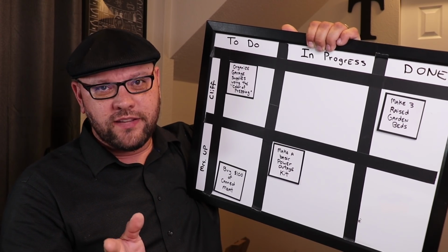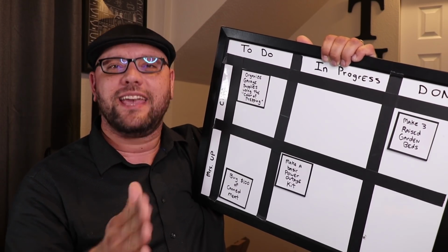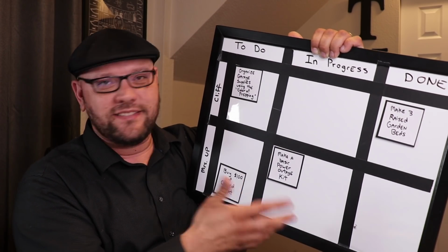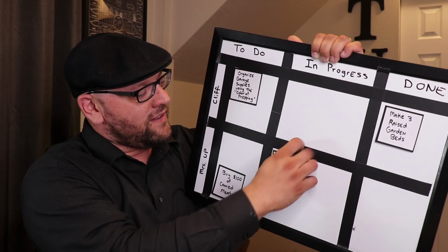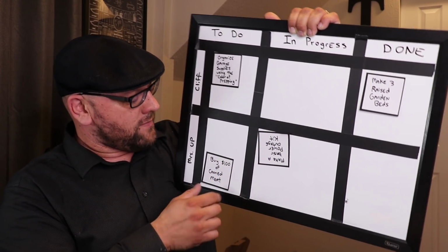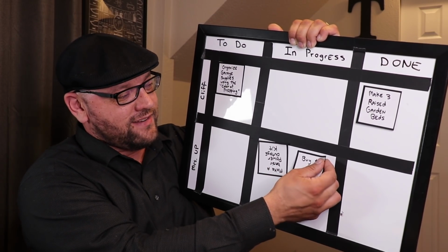So what we do in our team in software engineering is if we're blocked on something, that's a concept that, hey, I'm blocked, I can't move to the done column because I'm blocked for some unknown reason. So let's say something's out of stock. So what we normally do is we would move it upside down. That means that it's blocked at this point. And so at this point, Mrs. Urban Prepper could probably grab the next task that's in the list and then actively work on that.